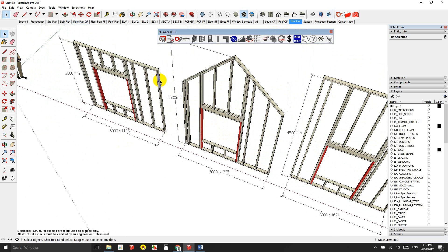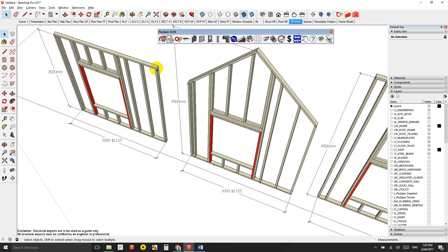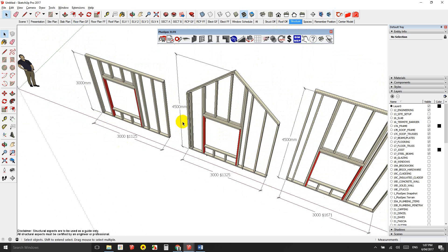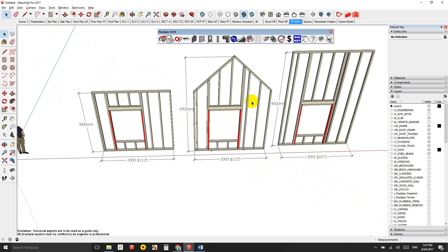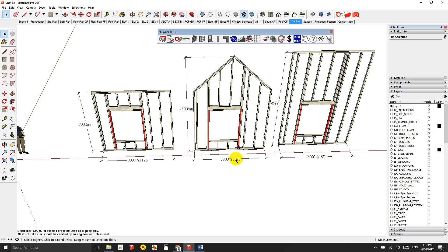So there's a big time saving. We deducted the top plate. We deducted the bottom plate and we can cut those studs. So not only did we save time with figuring out the lengths of the studs, we also saved a lot of money and making sure that our estimate was close. Now we would add our margin on top of this and we'd feel more comfortable. And obviously we always add for contingency in a job, you would add your margin on top, but at least you know what the cost is.